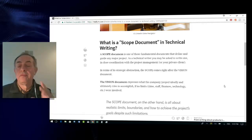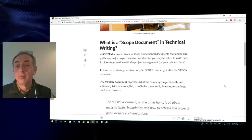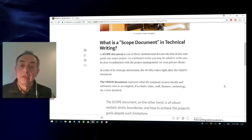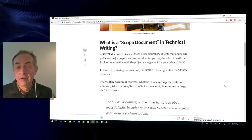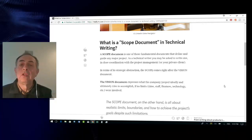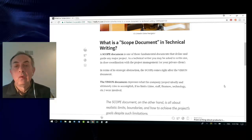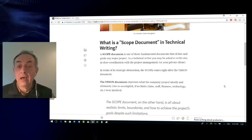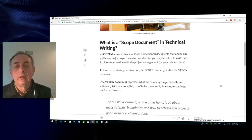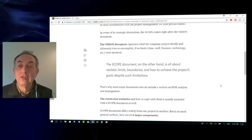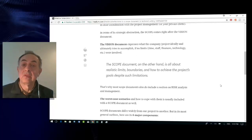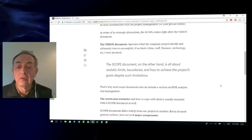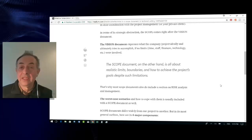In terms of general outlook, a scope document is related to the vision document and comes right after that. A vision document expresses what the project is ideally all about if there were no limits involved. The scope document, on the other hand, is all about realistic limits, boundaries, and risks. That's why scope documents also include a section on risk analysis and risk management.